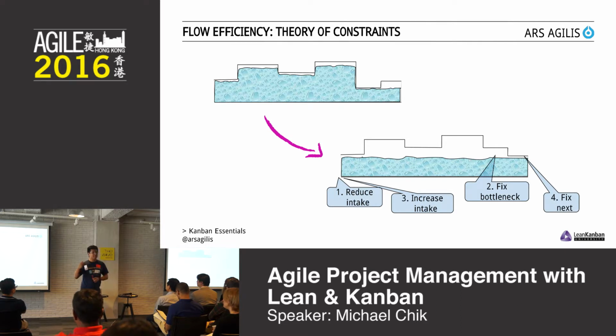You have a different capability within your organization to complete different steps. When water flows through on your Kanban board, you will immediately see bottlenecks. In this case, it will be this bit. And it's easy to identify because your tickets will just pile up in that column.